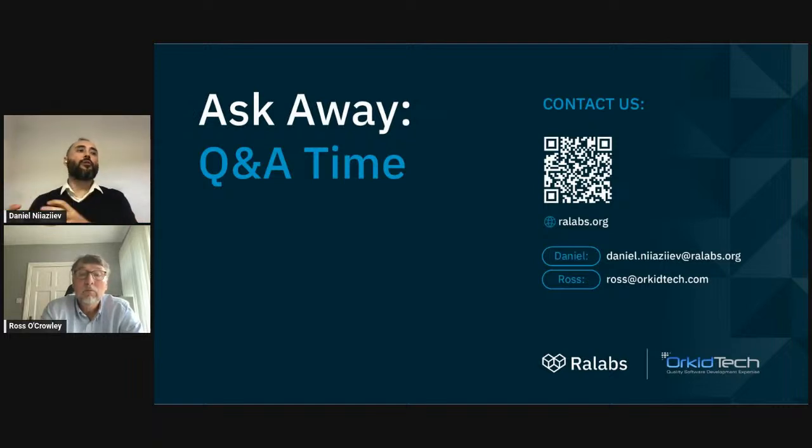We also talk to the teams. And if we have this kind of consensus that we need to address it, we try to find the time. Usually we build it inside existing activities, to not add additional meetings and not dedicate particular time. It's just an add-on to the plannings or groomings or the stand-ups, as a part of the regular Scrum or Kanban process. That's the way.